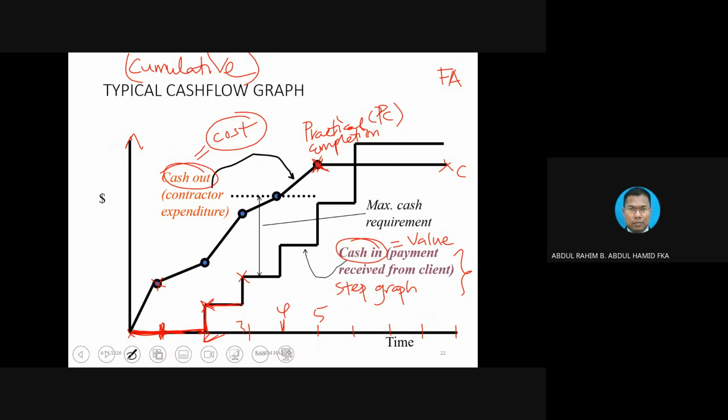So the cutoff will be the 25th of every month. But if you work in the private sector, they are going to pay you maybe on the 5th, the 6th, the 7th, because according to law, a few more days are allowable. You see how many days you have to wait.